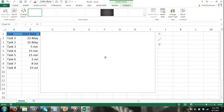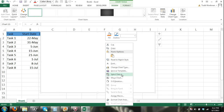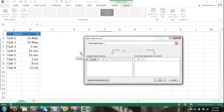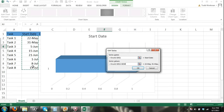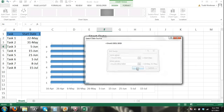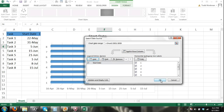Right-click in the chart area and in the shortcut menu click Select Data. The Select Data Source dialog box appears. In Legend Entries, click the Add button and the Edit Series dialog box appears. For series name, select the Start Date column header. In series values, remove the default data and select the range of cells containing our start dates, then click OK.